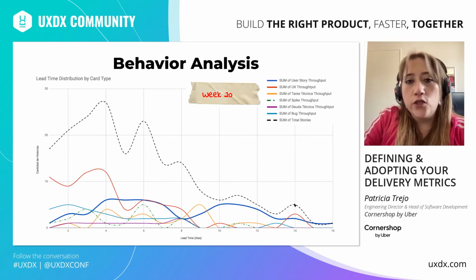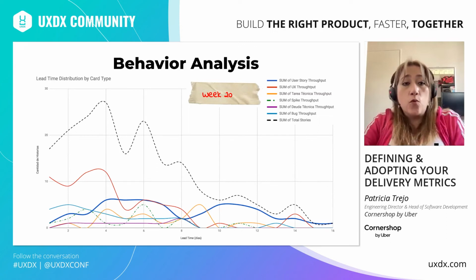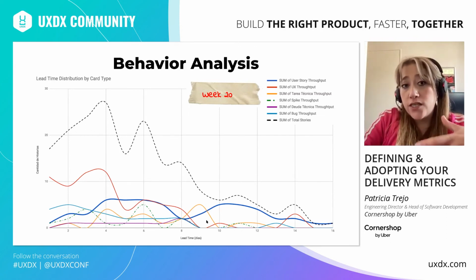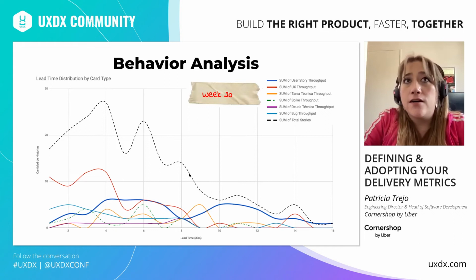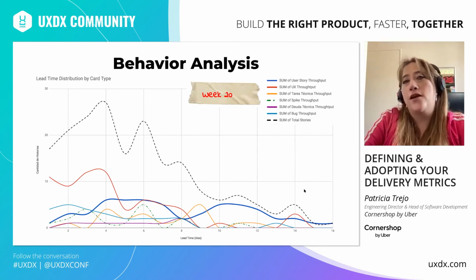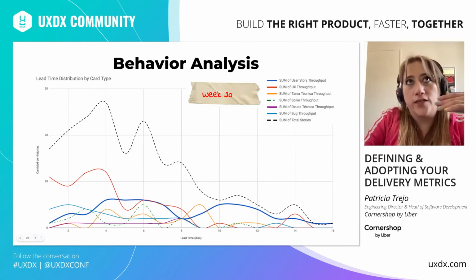So this could be useful if the team estimates, for example. Maybe instead of estimating, we could do some t-shirt sizing using this info, saying, okay, a small t-shirt is 4 days, a medium is 6 days, a large is 8 days, extra large is 11 days, and extra extra large, I don't know, is 14 days, for example. And remember, it's always working days.